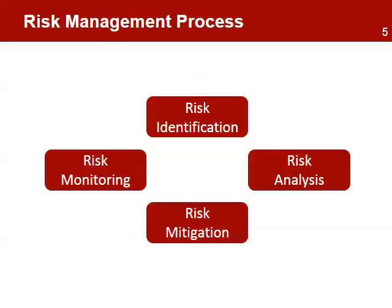Risk Management follows a cyclical process that consists of four steps: the identification of risk, the qualitative and quantitative analysis of risk, the developmental strategies to mitigate risk, and monitoring the risk. The process is continuous — as the project makes progress, new risks will be identified, and with additional information, some risks will need to be analyzed again.